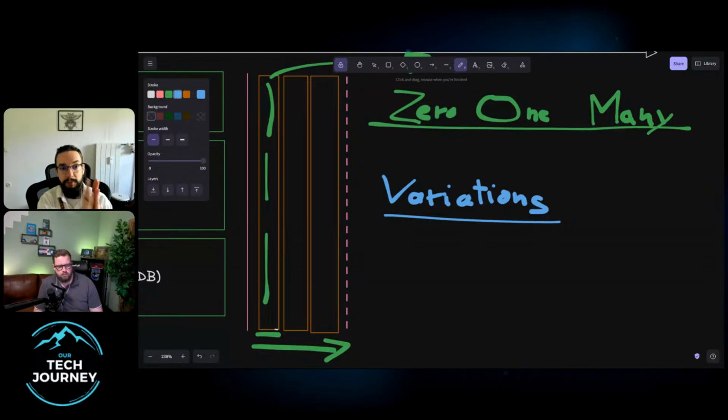And then we'll decide how to merge them together, right? So you literally maybe even create a full copy of the system where you say, well, I'm releasing a copy of the system that does this variation. And then rather than adding a choice of variation, I'm just going to create a copy of the system that does only the second variation. And then only when you have two, when you add the third one, then you add choice.